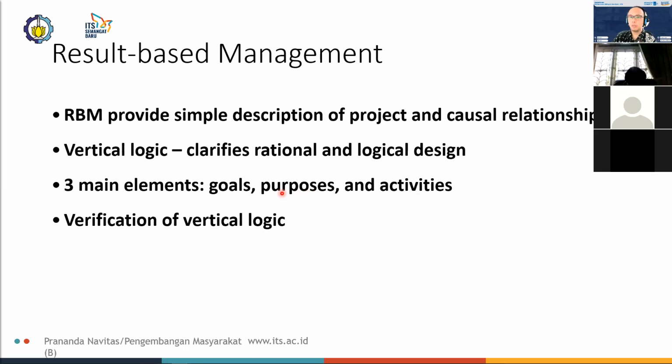and then you would need to verify your goal with the purpose of the facility. For example, you're dealing with literacy issues, so your goal is to establish a community library. What is the purpose of the community library? The community library's purpose is to provide members of the community with accessible books, and giving them access to reading materials would improve their literacy. So the purpose then justifies the goal.